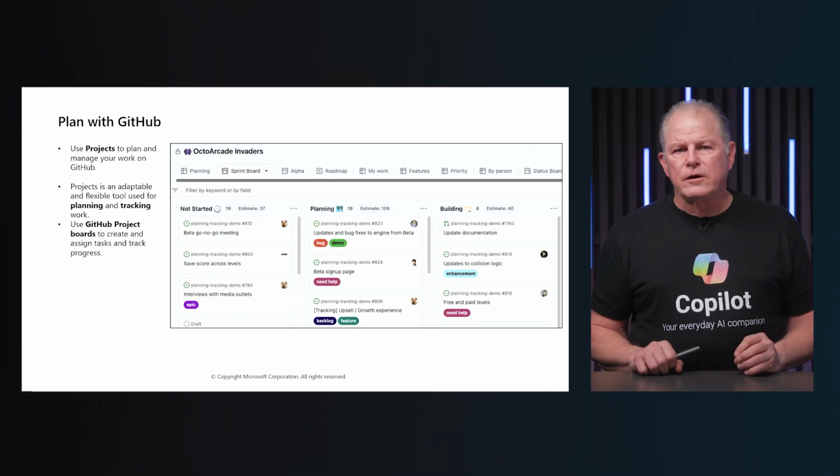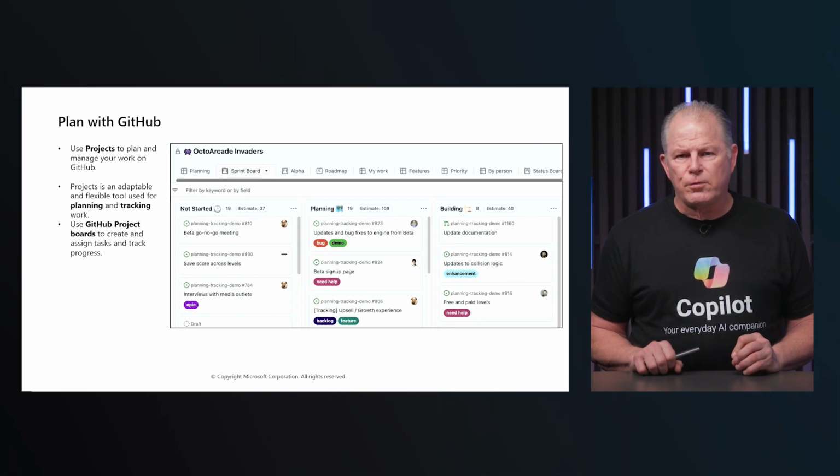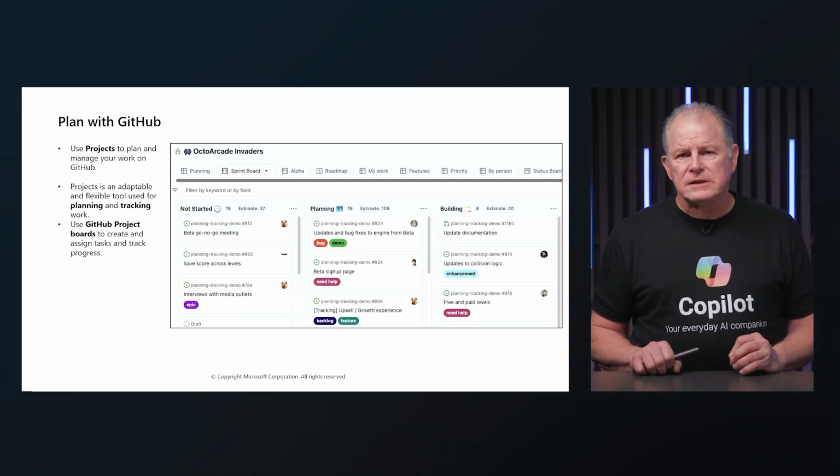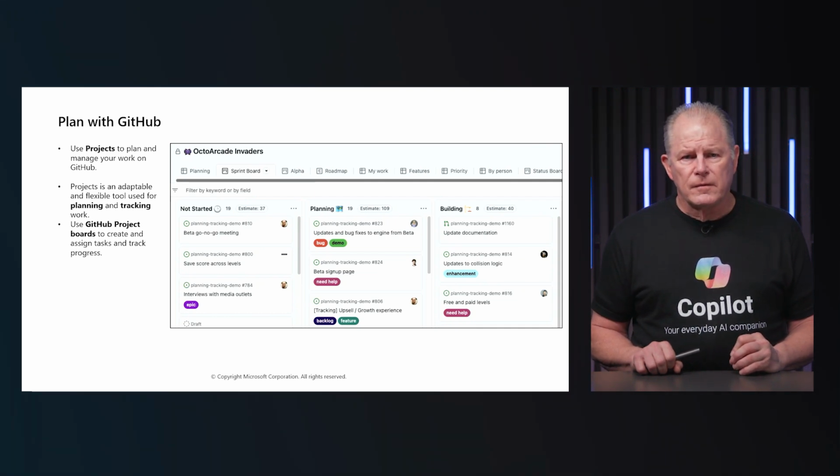Imagine a DevOps team working on a new feature deployment. They use a GitHub project board with columns for backlog, in progress, code review, testing, and done. Each task is represented by a card linked to a GitHub issue or pull request. As tasks progress, they move across the board, providing a clear view of the current status. Automation rules update the board based on changes in the repository, such as moving a card to code review when a pull request is opened. This integration ensures that the team can track both tasks and code changes effectively, leading to faster and more reliable deployments.